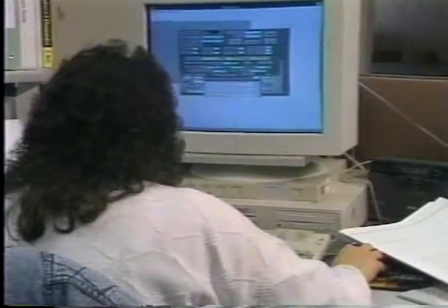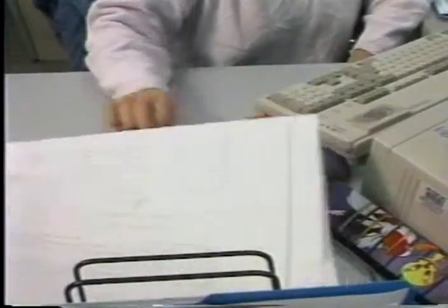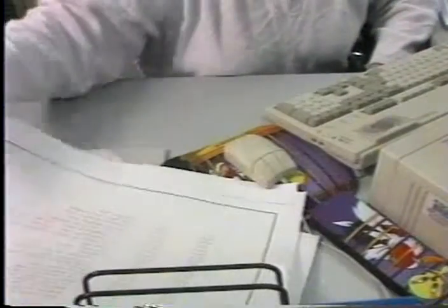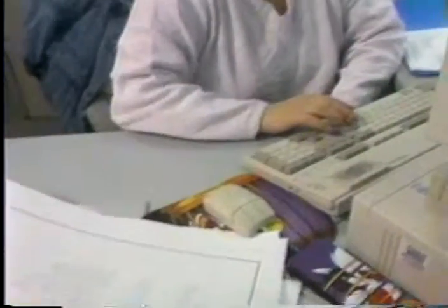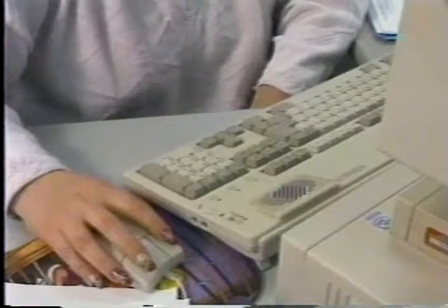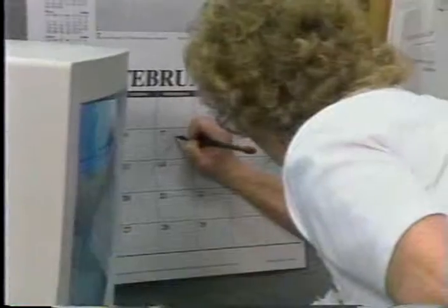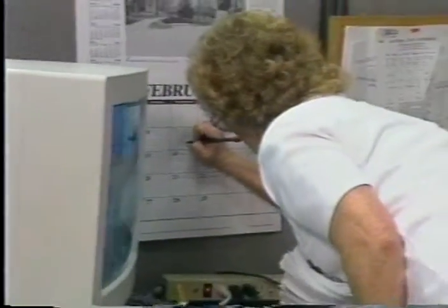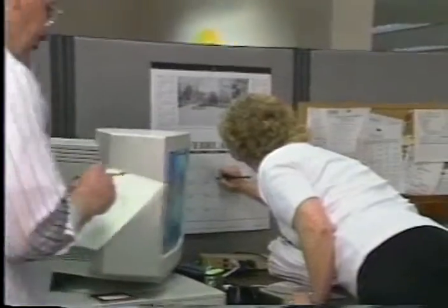Computations are made for each activity and totaled to determine a profile of skill level needs. It is not necessary to make computations for every month. Computations should be made for key months in the calendar year.